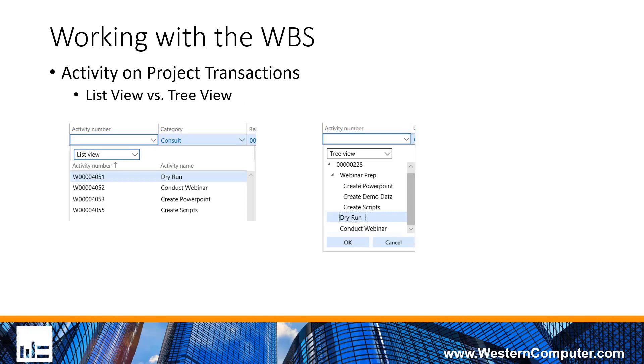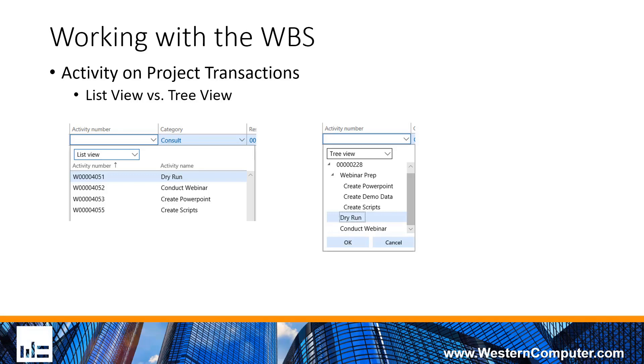When you're recording project transactions, you have the activity field on the project transaction. When you hit that dropdown, it's going to be the list of tasks in your work breakdown structure. There are two views for that list. One is the list view, which is just a straight list of the tasks. The second is the tree view, which gives you the hierarchical representation of the work breakdown structure. You can choose which one makes the most sense when you're looking at the tasks and recording transactions. Sometimes the tree view or a couple extra clicks to drill down does give you some perspective as to what is happening on the project.